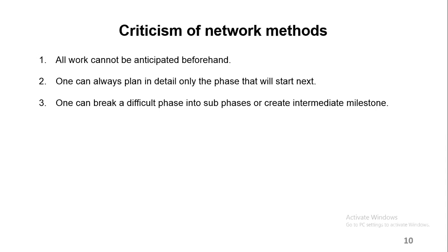The other one is saying, again, one can break a difficult phase into sub-phases or create intermediate milestones. Like I said, for some of the activities, you might think it's simple, but then when you start doing it, you notice that this thing is way complicated. So sometimes you might find yourself cutting down the project into sub-phases and creating intermediate milestones. It's because initially you underestimated the project, or you thought the activity was just a simple one.